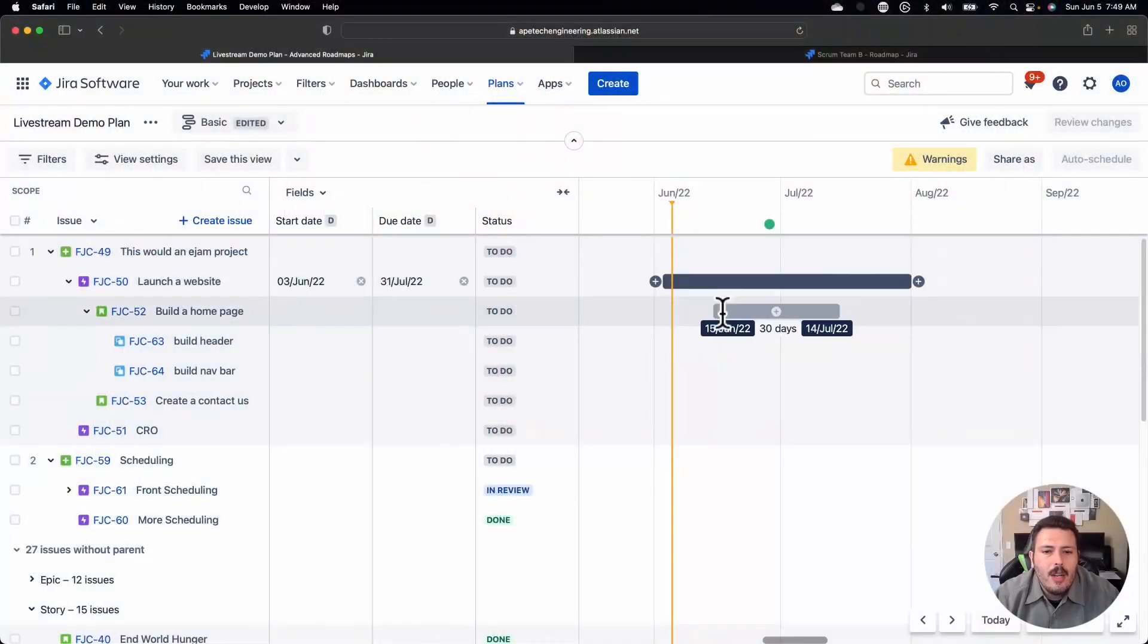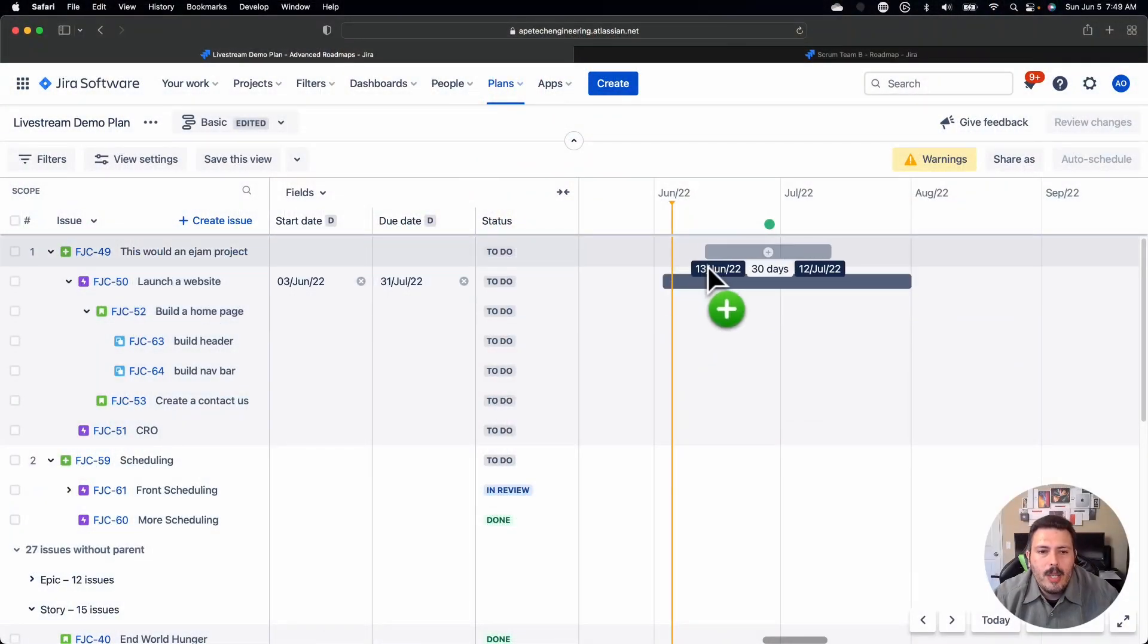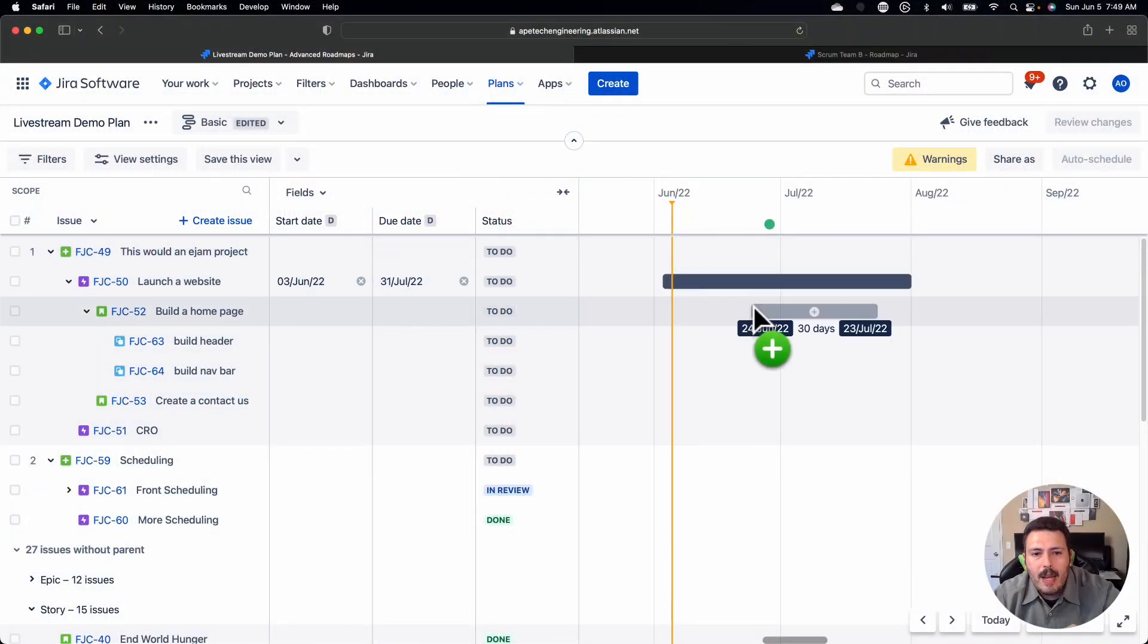I can do that in the advanced roadmap. And then obviously, I can push that stuff down to the teams. But now if the teams want to kind of work collaboratively, and maybe they have some autonomy, you want to schedule a meeting after they've set their dates, the teams can effectively go into their basic roadmap, do the changes there in their little world that they own. And then the scrum master, project owner, program manager, those type of folks that are more high level, they can automatically see those changes be reflected in their plan without the need of additional synchronization meetings. So that bi-directional update between the advanced roadmap and the roadmap is feature number nine.